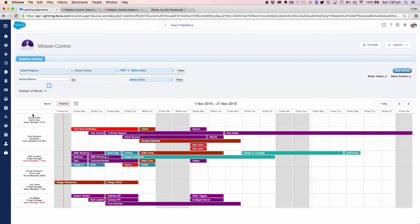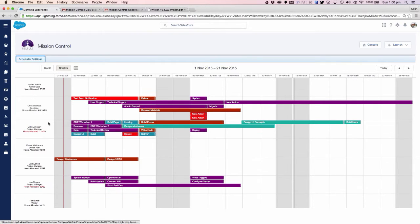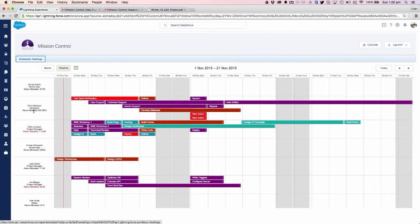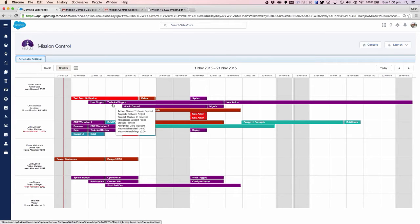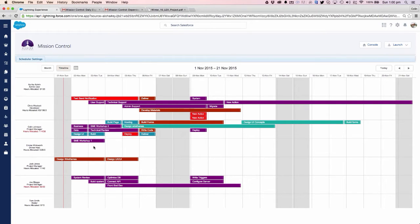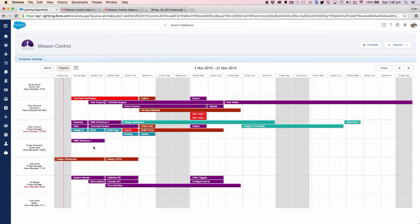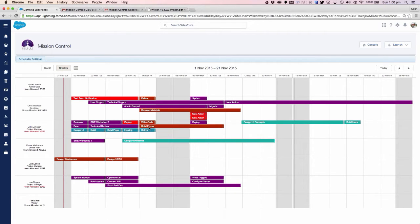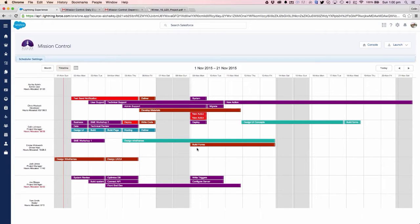I'm able to see the capacity of all of my project resources and exactly how they're doing against their allocation. For each individual person, I'm able to see how many hours they're allocated over this three-week period and how many hours have actually been put to them. If someone's actually over allocated, we're able to drag and drop those and reschedule to make that capacity available and utilize someone else's availability.